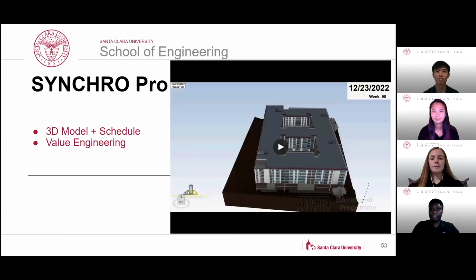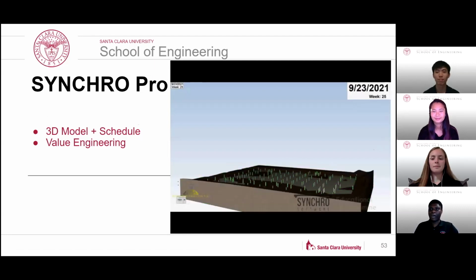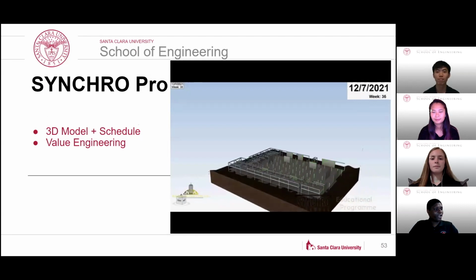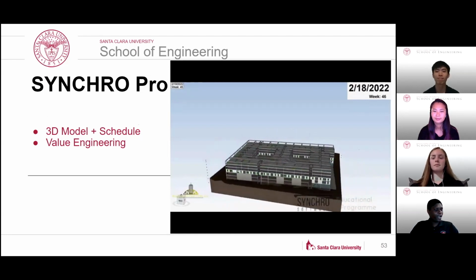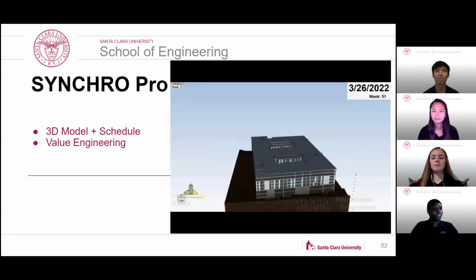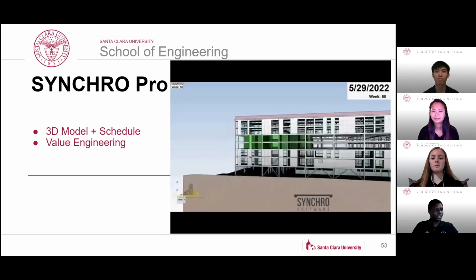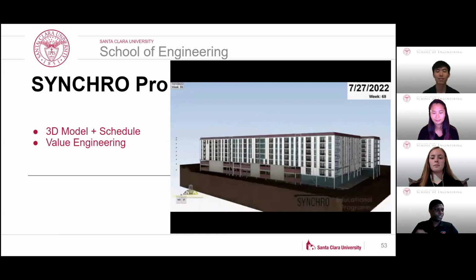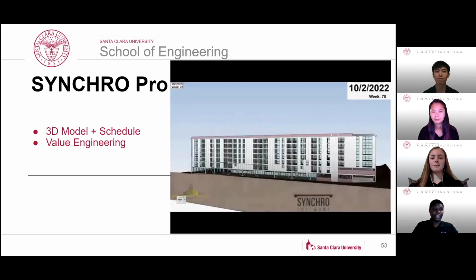And finally, to tie both the BIM model and the project schedule together, the use of Synchro Pro, a 4D modeling software, offers a time-sensitive representation of the model as construction takes place. Animation of the construction of all major scopes associated with the project has been created with this video. As you can see, the steel framing and the concrete columns and walls have been constructed, and each level follows each other. Along with this project schedule that I created, you can see the exterior walls lagging behind the floor construction. To be most productive, that's the approach that we took for this project. Synchro Pro offers such a valuable use case for the project owners, including all the subs, main contractors, and especially anyone who wants a visual representation of how the project is going.